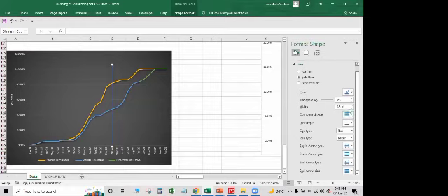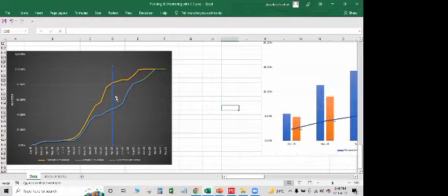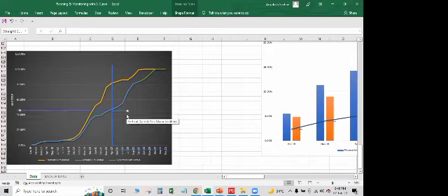So simply I'll put it like this, here and then here. So in the month of April, my plan was to achieve something around 80%, but in actual I was only something around 43 or maybe 45% somewhere, right? So this is how you can easily read the S curve, right?